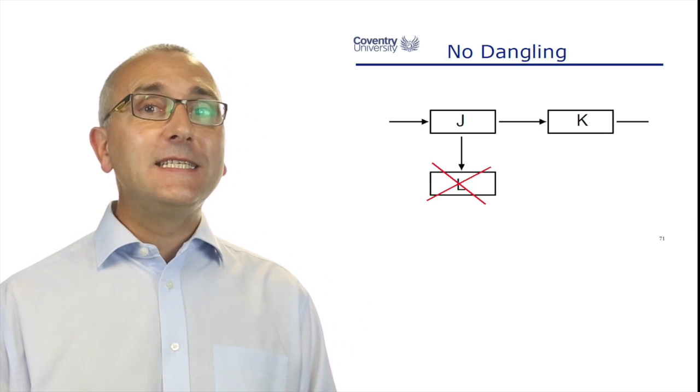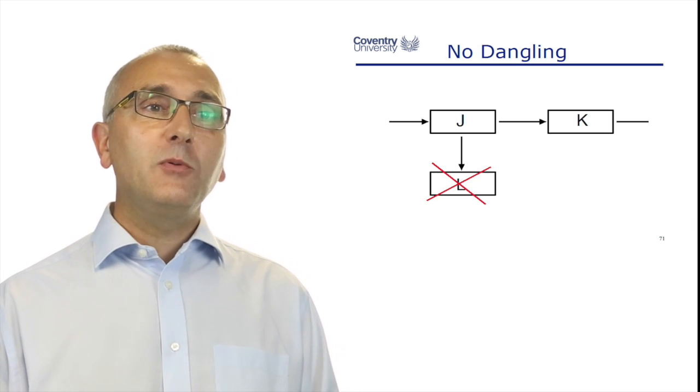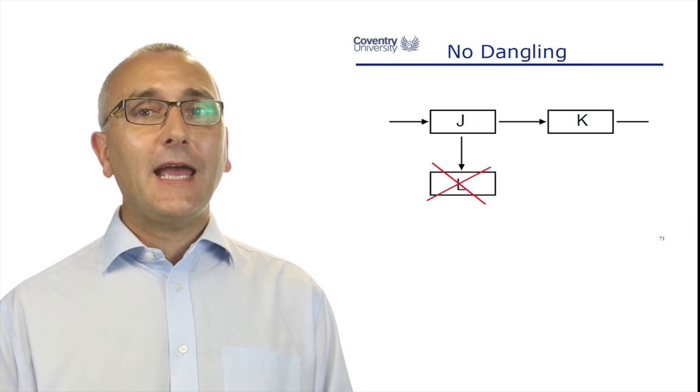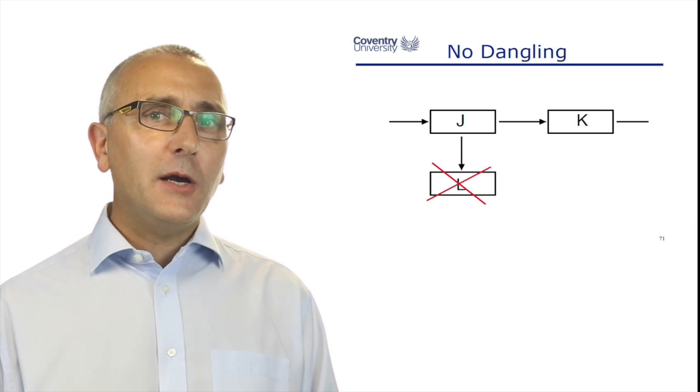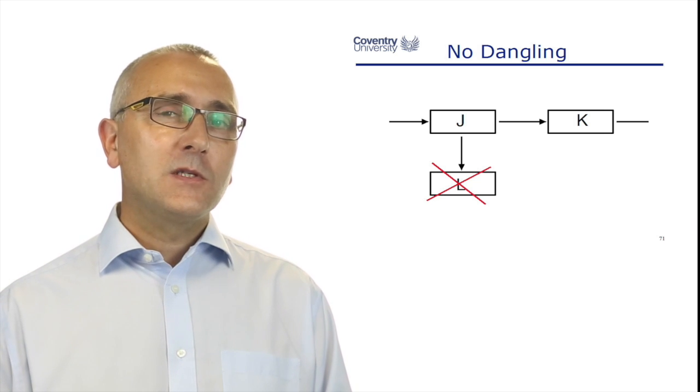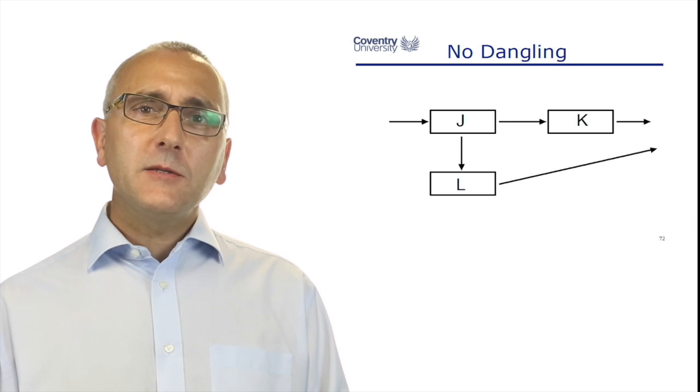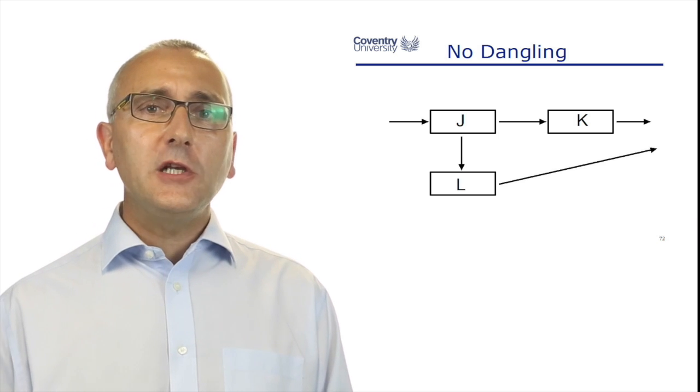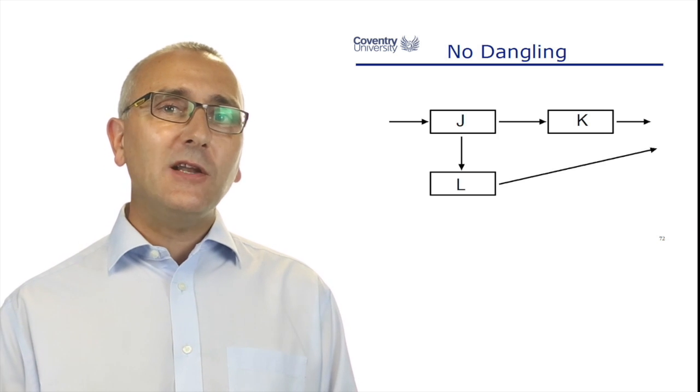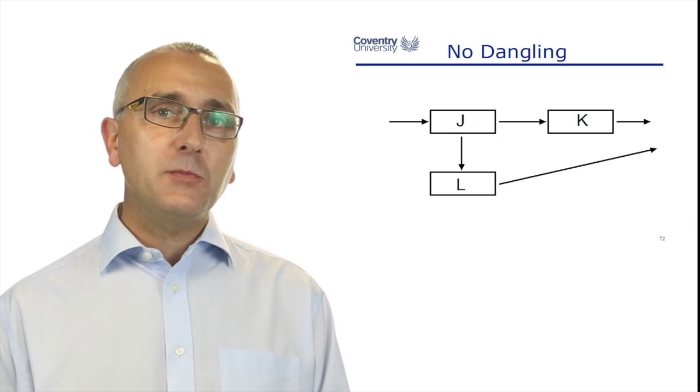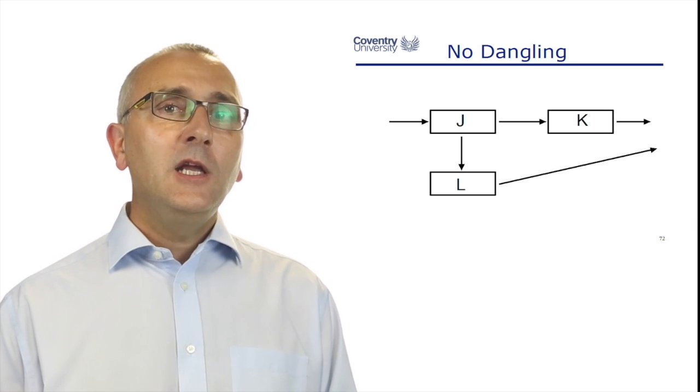The second rule is we can't have things dangling. Everything must go somewhere. In this example, when J is finished we can start K, and when J is finished we can start L. But L isn't going anywhere, so why are you doing it? Nothing's dependent on it. Then somebody says, well, we have to do L. Usually you've forgotten that L leads into something else. We can't do this until L has been approved as finished. So no looping, no dangling.